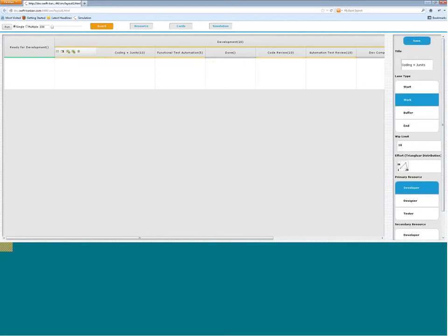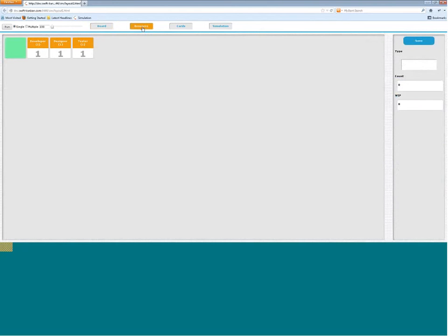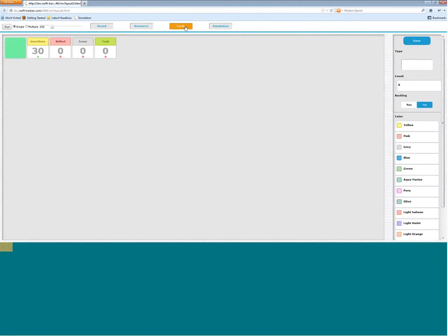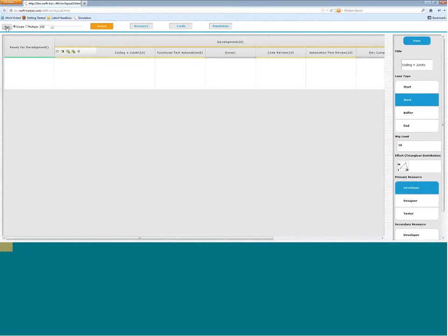For each of my lanes, I define a simple team profile, and I define a simple inventory of my user stories, defects, issues, and tasks. So it's a very clean definition, and if this is my team profile, if this is my inventory profile, and if this is my Kanban board actual data profile, then it helps me to see where my bottleneck is.